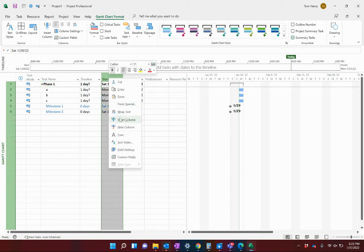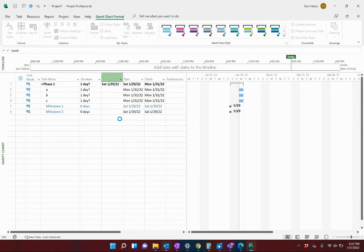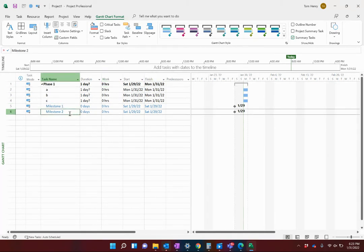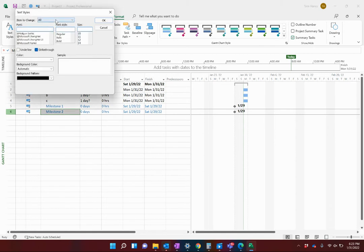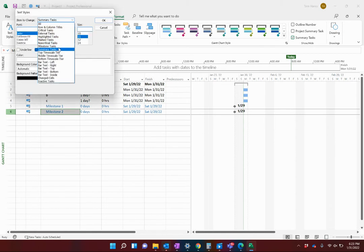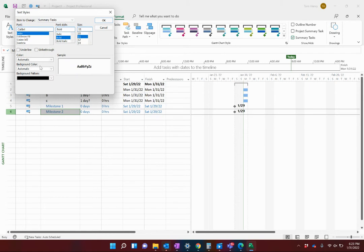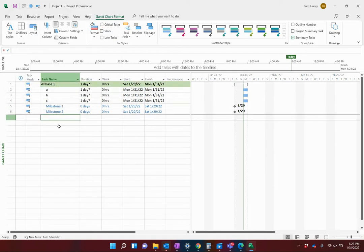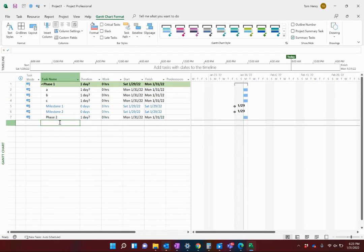Here are a couple of things I'm going to do to change it up a little bit. I'm going to insert a new column — you might want to have the Work column or any columns you want in here. I've highlighted my milestone tasks in light blue, and I'm going to do the same thing for my summary tasks. I'll make the background color a light green for my summary tasks. All new summary tasks that I create will have that light green automatically.